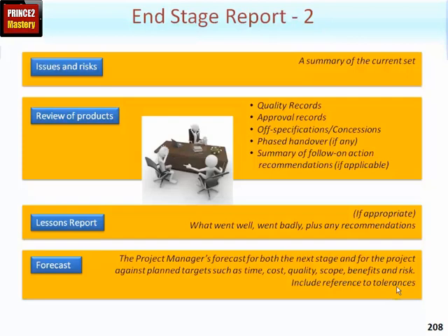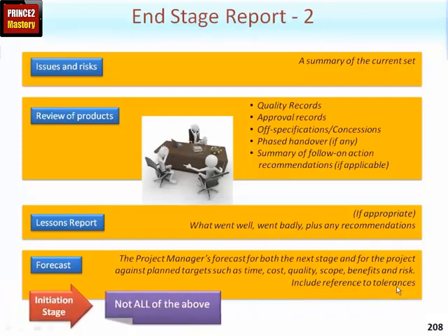Now, just one final point, and that is that where the end stage report is being produced at the end of the initiation stage, that being usually a very much more informal and tending to be a shorter stage, because what you're doing there is to create the PID itself, there won't be any specialist products being created, so that not all of the above sections within an end stage report may be necessary.